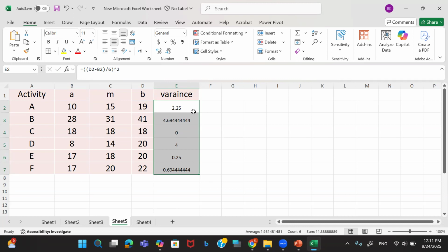So our goal, why we're doing that? We are doing that to calculate the variability for the project. Why we need that? Because let's say we have a project and we said we will finish the project in 16 days or 15 days. Okay, but nothing is perfect. So if you have been asked, what is the probability that the project will be completed in 15 weeks or days? What is the probability that the project will be completed in 20 days? So you need to answer this question.